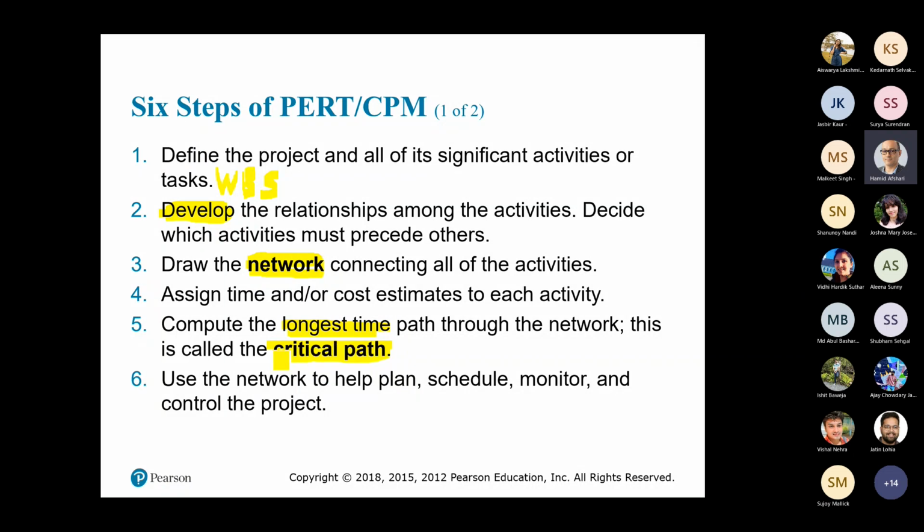So you cannot ignore some activities. You should consider that some activities take longer time. Okay, and the guy who finishes in half an hour, how much extra time does that person have to relax or do something? Another half an hour. And the guy who finished in 45 minutes, how much extra time does he have? 15 minutes. Excellent. So that extra 15 minutes is called slack time. Okay, slack time. So that extra half an hour or 15 minutes can be used for other purposes.